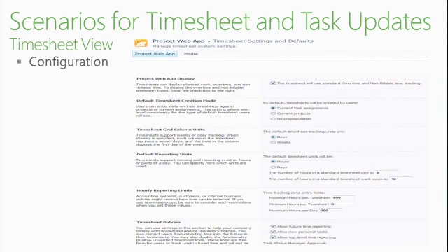But you're saying 8 hours a day, so I know you'll get a message that'll come up if you try to put more than 8 hours in a day. Right, in this case, yeah, the standard timesheet day is 8 hours. So the 999 is irrelevant. The 999 is the limit you cannot exceed. You won't. You never will. Right. Yes. We just take the 7 days a week and multiply it by 24. But what about overtime? Overtime will be captured in a different place where you will have these categories.